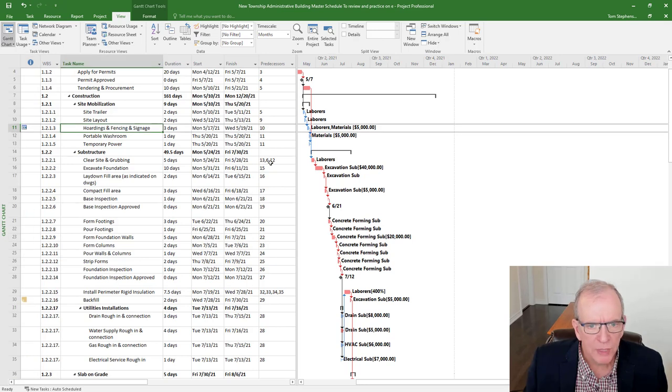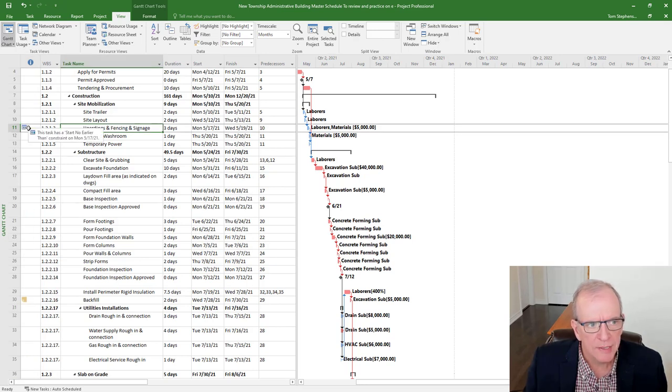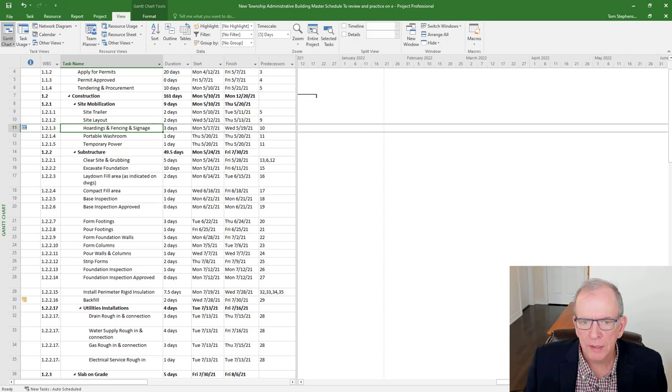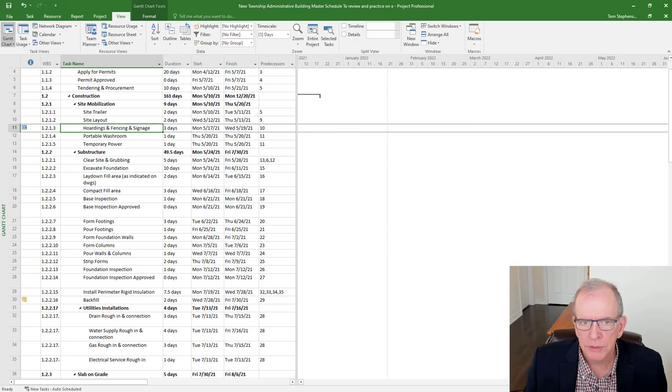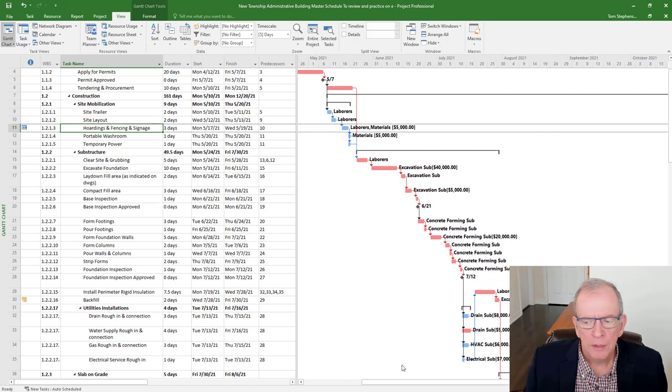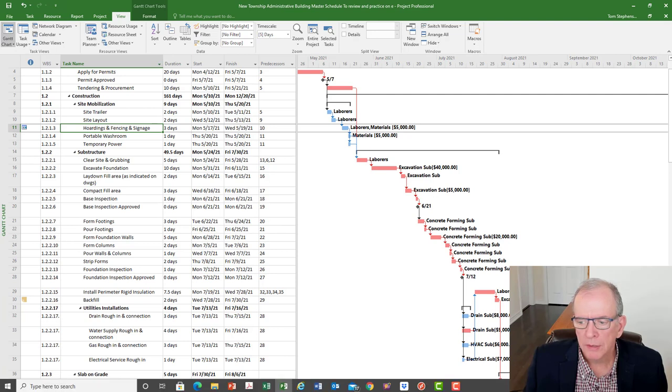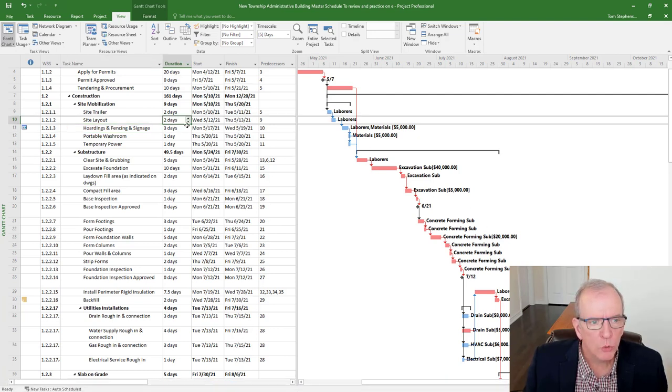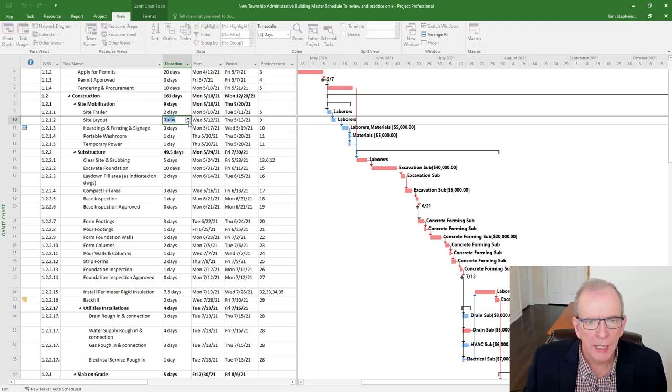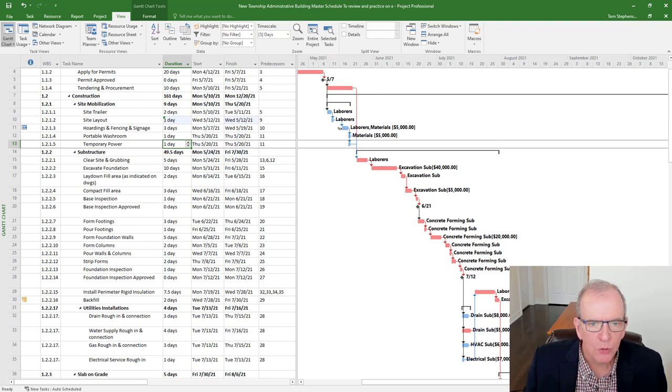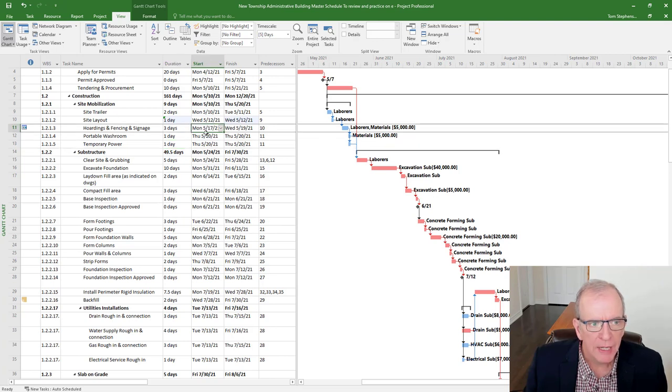Well, the biggest problem with this is it actually put a constraint that says has a start no earlier than. So that means no matter what happens over here. So if I actually zoom there. Now let's say I shorten this to one day. Watch what happens. If I shorten this to one day, and I click over here, it shortens this, but it won't move that because this is not allowed to move any earlier. So when you clicked on that date, it actually put a constraint on this activity.